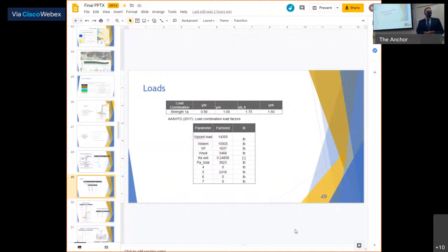On the very bottom, we do summarize total improvements to San Angelo, and that includes the work done by the city of San Angelo to readjust the water line. AEP has already volunteered to move the electric pole in the area to a finalized location. All of these things were summarized, and they came up to, I want to say, about $76,000 that isn't going to be billed to the client directly, but are still direct improvements to the street. Very good. And it was really only $76,000 to do all that utility rewiring? According to our cost estimate, using the unit pricing.